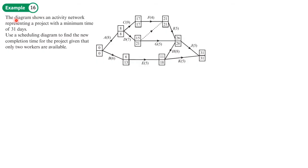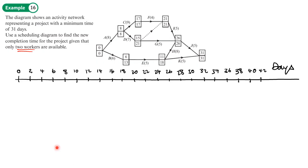Example 16: the diagram shows an activity network representing a project with a minimum time of 31 days. Using a scheduling diagram, find a new completion time for the project given that only two workers are available. I'll draw my scale along the top here. I know I'm going to be going beyond 31 days. I don't know how much longer.